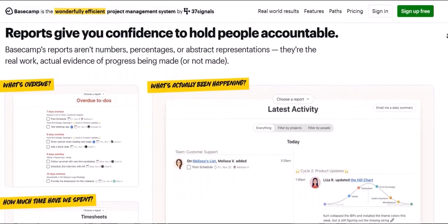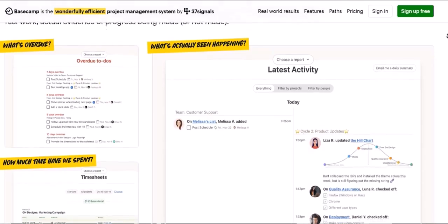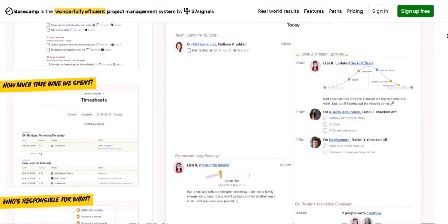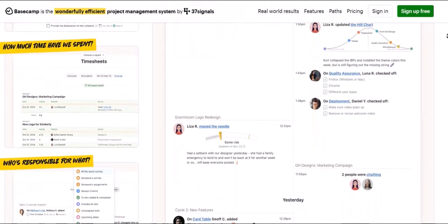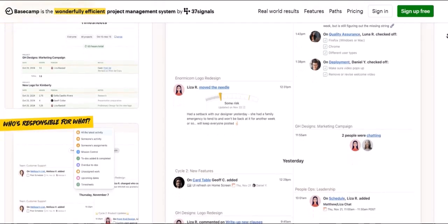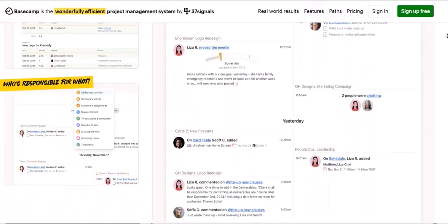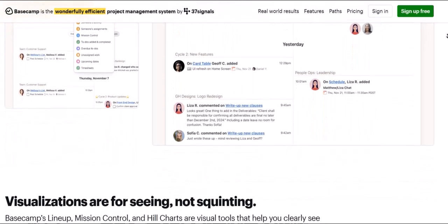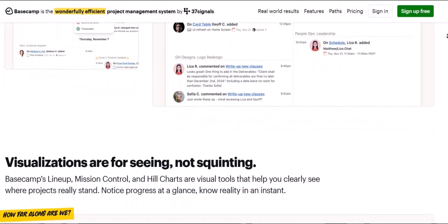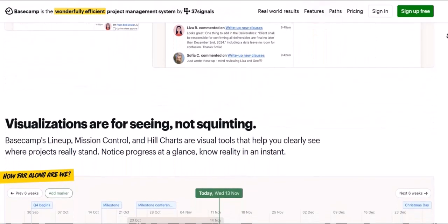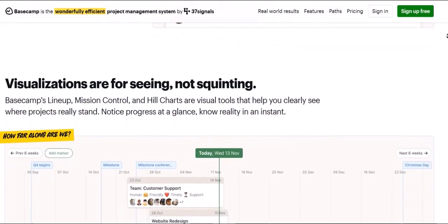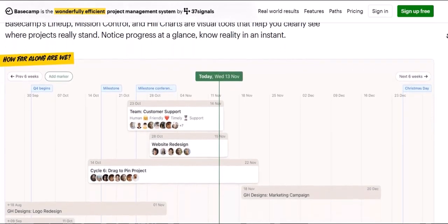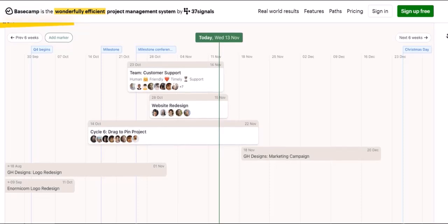This means to-do lists. Lay out all the tasks, subtasks, and checklists that are common to this type of project. Group them logically. Message board topics. If you typically kick off projects with specific announcements or gather standard information via messages, include these. Docs and files. Include any standard operating procedures, brief templates, essential forms, or common assets that are always needed. Schedules. Set up any recurring milestones or typical phases with their corresponding due dates. You'll adjust actual dates when you use the template, but the relative spacing can be valuable.